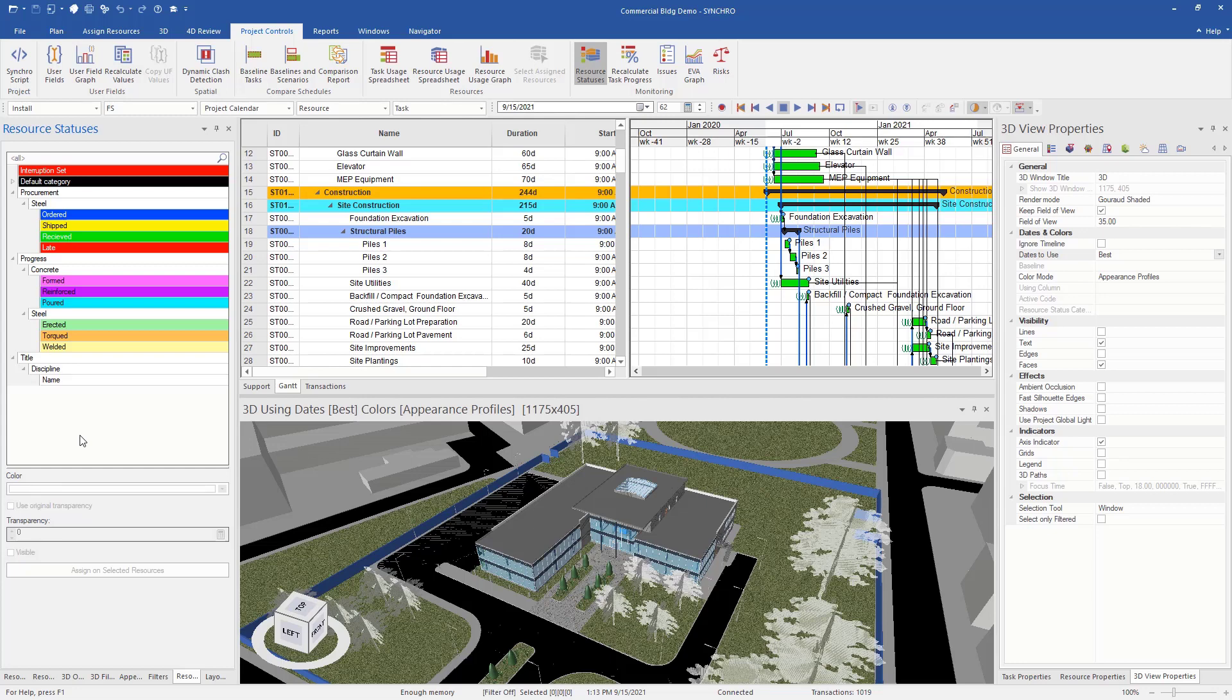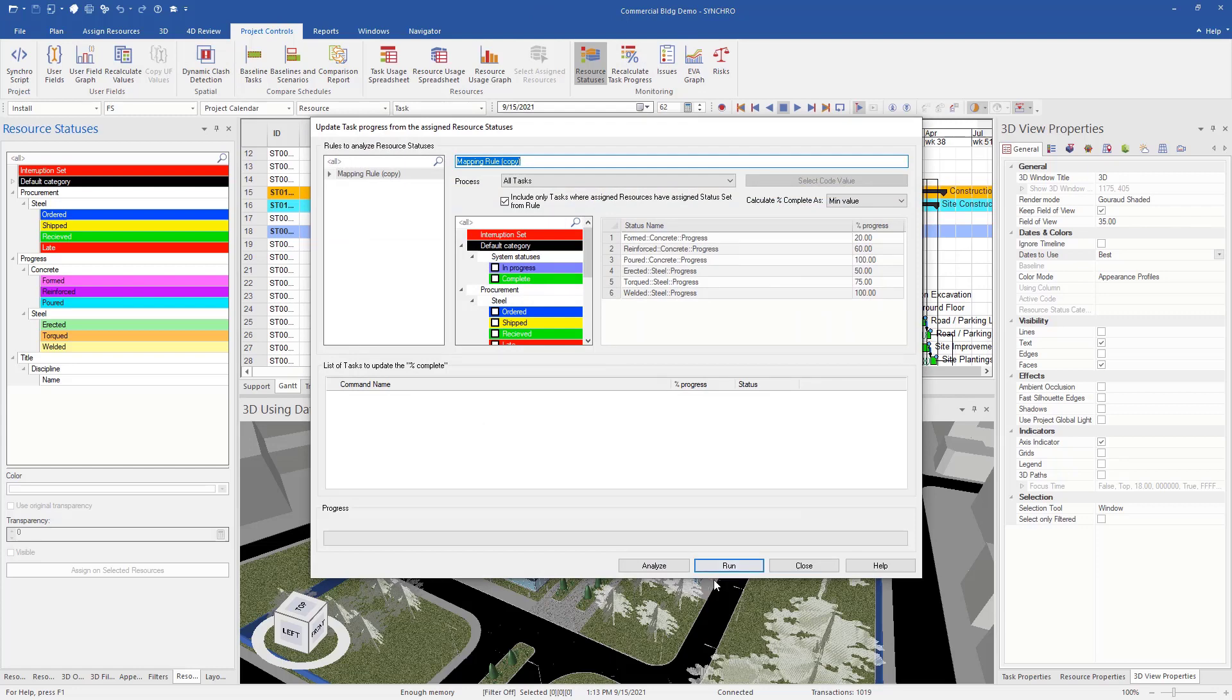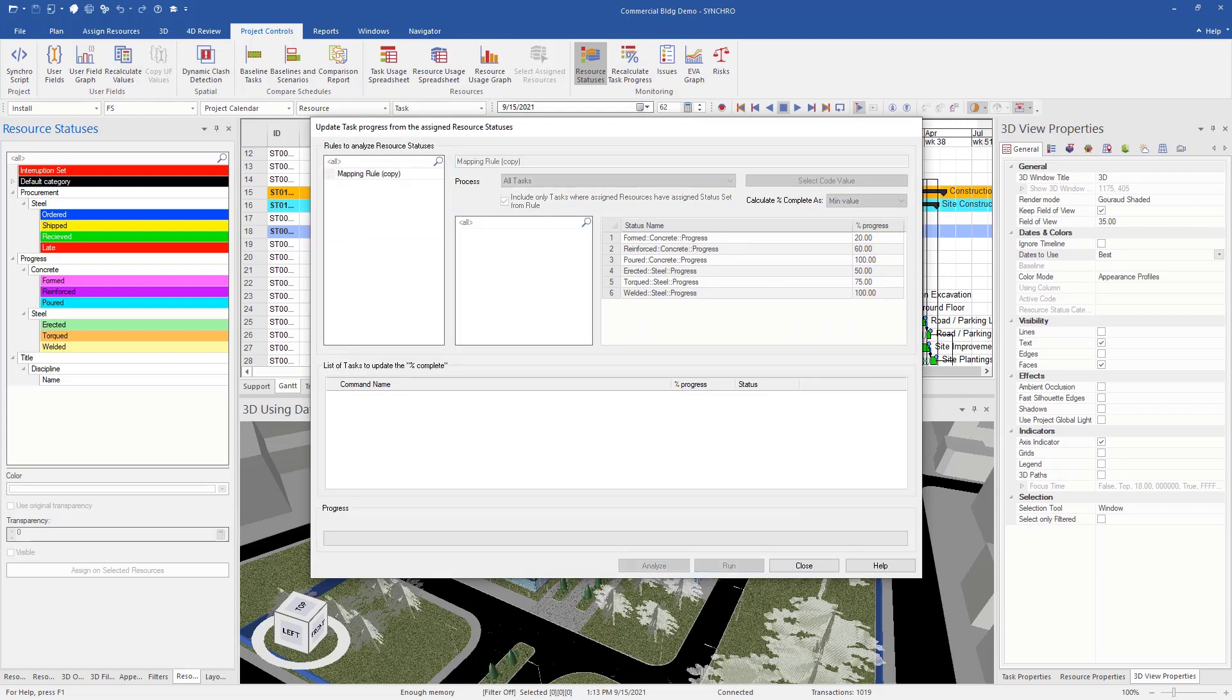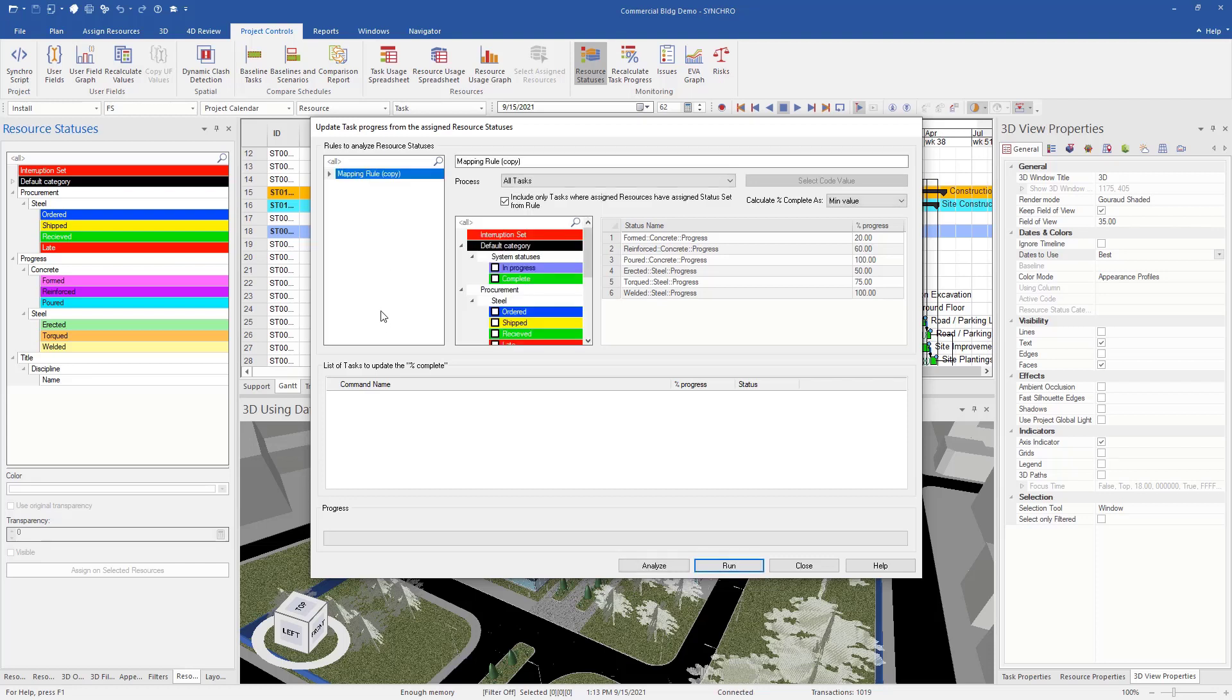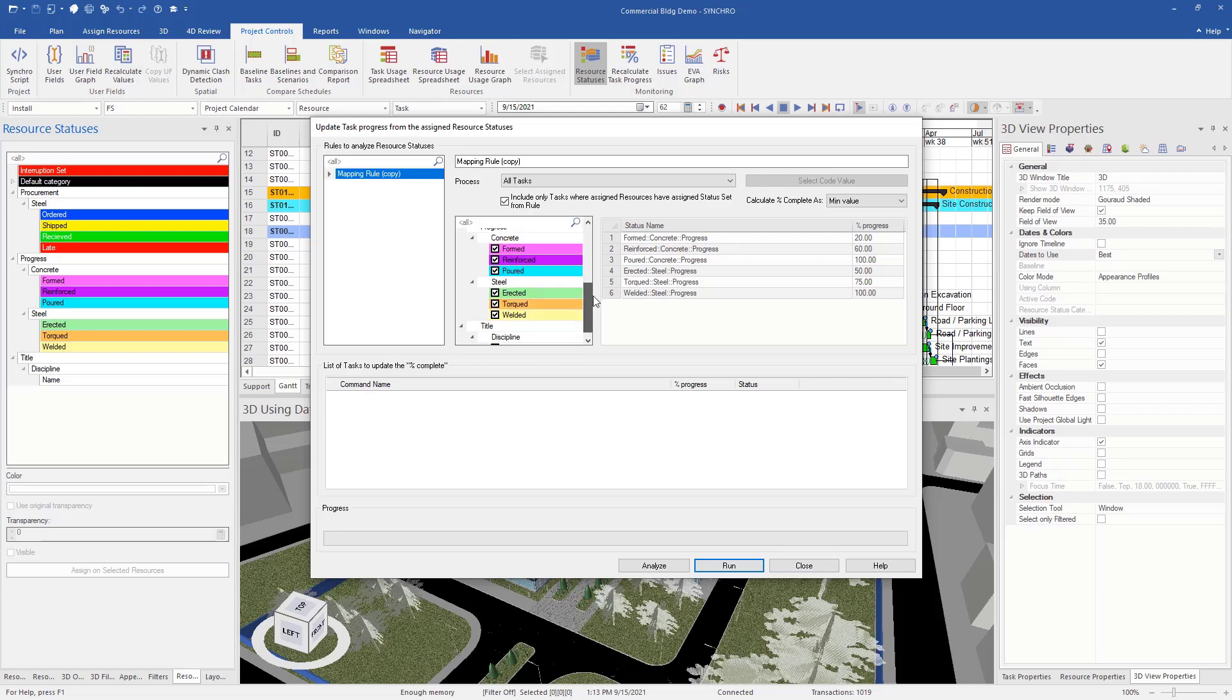So once the resource statuses are created, we can actually give them percentage weights. And to do that, we're going to want to again go to project control, recalculate task progress and it's going to open up this window. So if we don't have this selected, you can see it's blank. We want to make sure we select our mapping rule and then we're going to scroll down to our different resource statuses.